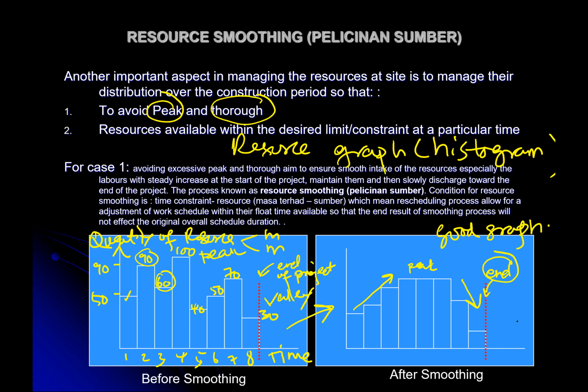Not only that we need to know the critical path, because when the total float equals 0, those activities can be considered as critical activities. When we connect critical activities together in a path, they are called the critical path. That is one example of the usage of what we call total float.